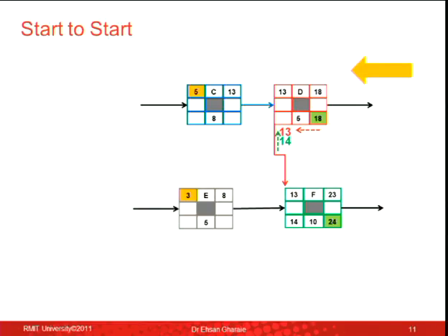So between 13 and 14, I've got 2 options. Which one should I choose? 14 or 13? 13. I'm going backward. I choose the smaller one. Yes? 24, my assumption. I haven't calculated it. So those green boxes there, I just put it there. It's part of the network. So between 13 and 14, same rule applies. Going backward, I choose 13.